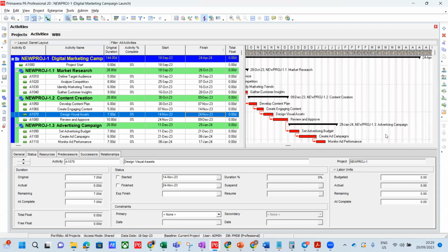Because they put a lag in between them, what you would have seen is A finishing on the 27th, then you expect B, if it's 5 days calendar and maybe the 27th is on Wednesday, just for argument's sake, you will expect B to start the next day. Then you will now see B starting on the 2nd of October. That is where you will now be wondering why. You look at it, it's finish to start, but A finishes on the 27th. Why is B now starting on the 4th?